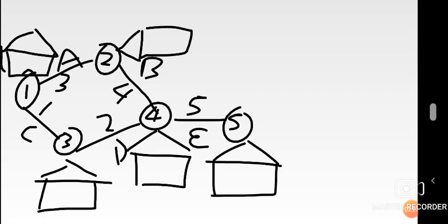So now you start putting in, of course, those figures as we put. So we got the first node. As of the first node, what would be the earliest start time? Well, just a refresher, as was stated in that video for critical path method, that box-like structure is where we put the earliest start time. So just like on node 1, what would be the earliest start time? It's usually 0 in node 1.